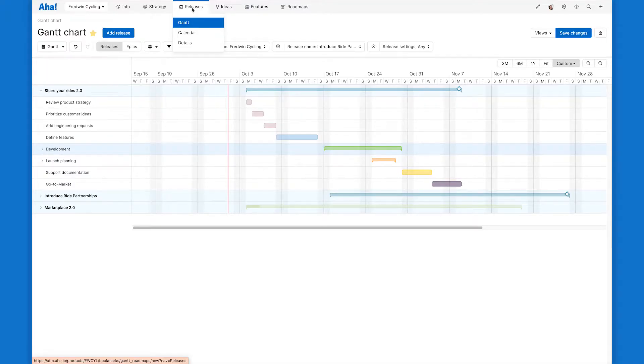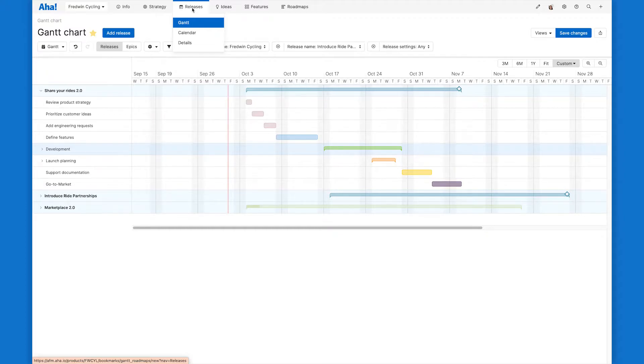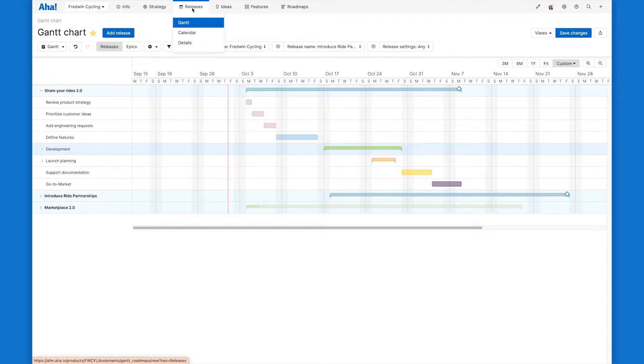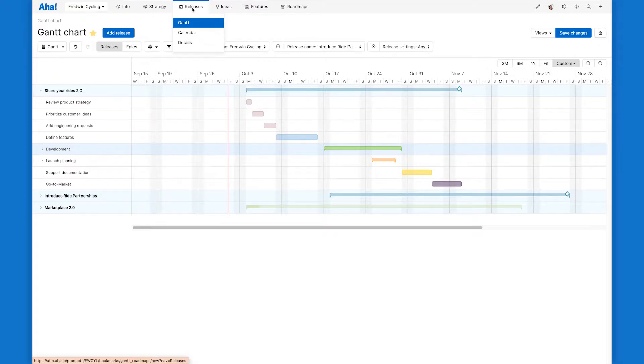Here I am on the Gantt chart in the releases section of AHA Roadmaps. Depending on the type of workspace you have, this might be called schedules. Either way, the Gantt chart is a great way to visualize all of the cross-functional work that has to come together, including all the phases, the features and activities within those phases, any milestones, as well as any dependencies at play, so you can manage your plan and ensure a timely launch.